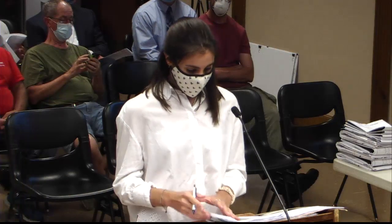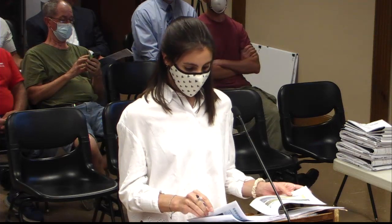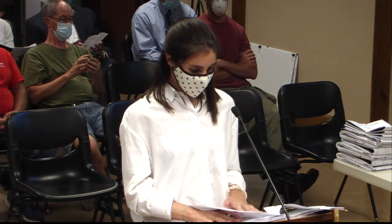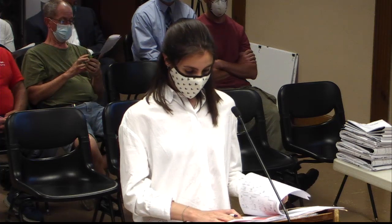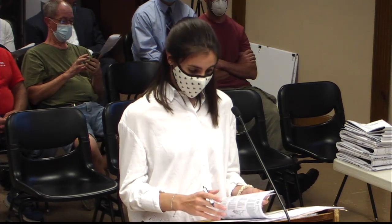So just to provide an update on the materials that we had provided, similar comments. Again, apologies for the last minute change. I will leave this with you. The modules have changed for this project, as well, for similar reasons. It mostly has to do with supply constraints. So I will leave this additional spec sheet with you all for the Longi module so that you have those for reference. None of the other details have changed.